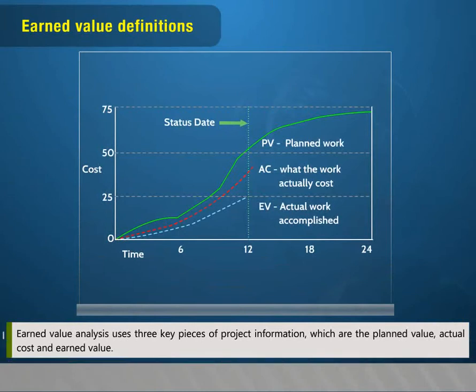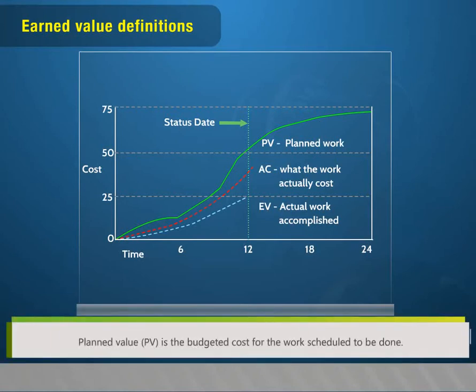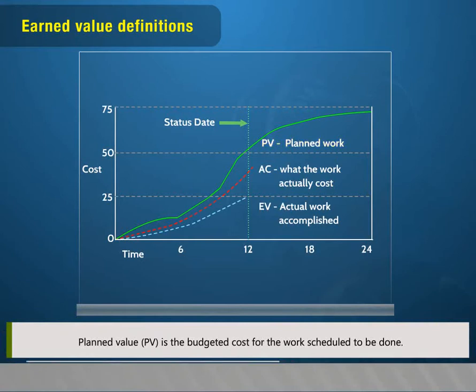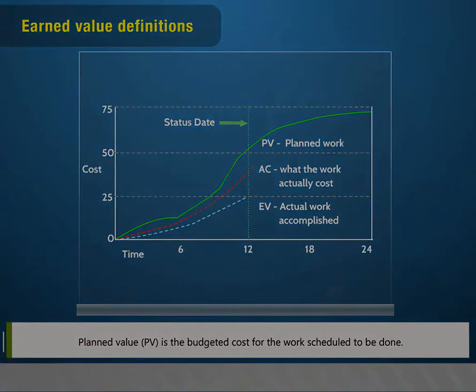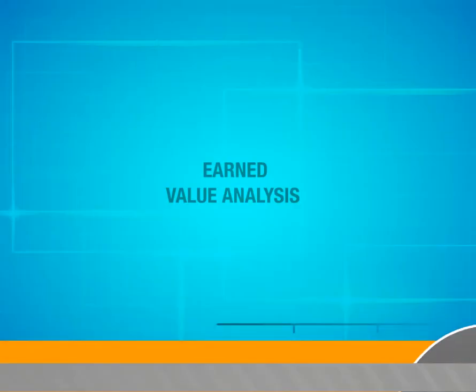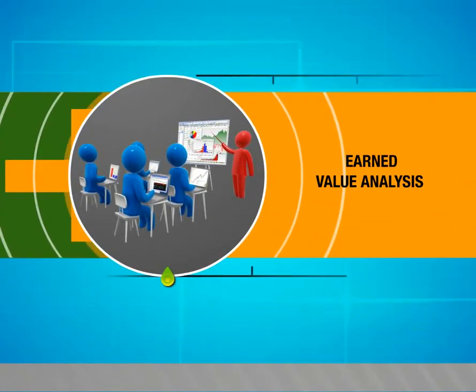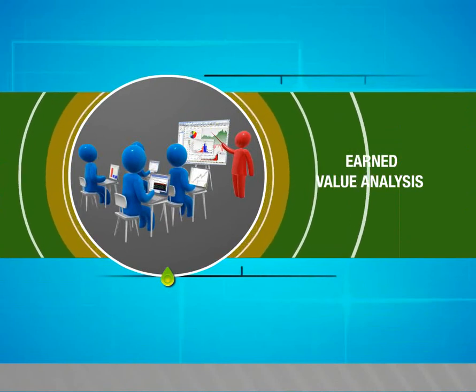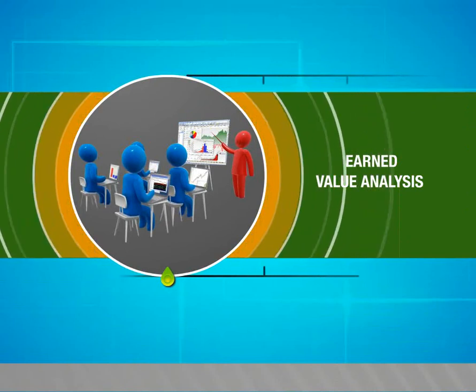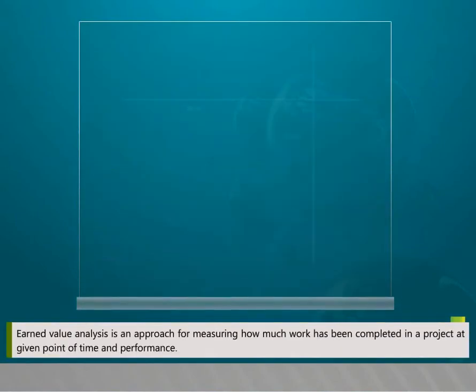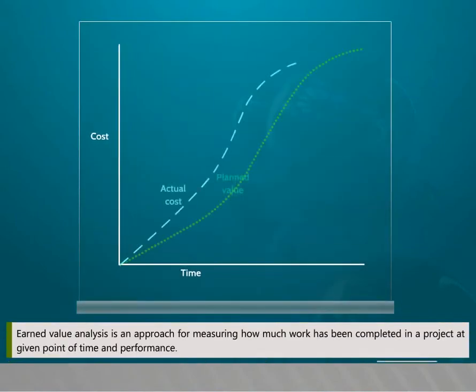A baseline, original plan plus approved changes, can determine how well the project is meeting its goal, and the baseline acts as a benchmark. The earned value technique compares the cumulative value of the budgeted cost of work performed, earned, at the original allocated budgeted amount to both the budgeted cost of work scheduled, that is planned, and the actual cost of work performed, that is actual.